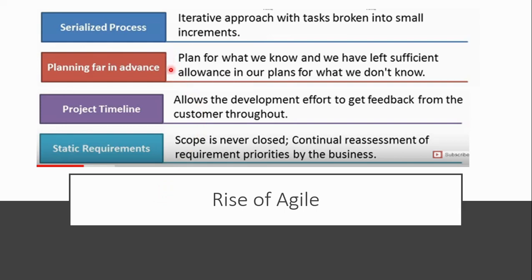Also, we learned in scoping and project scheduling, if you can recall, the rolling wave planning method, where you plan in detail for the current phase, and for future activities you have a high level view of the schedule.